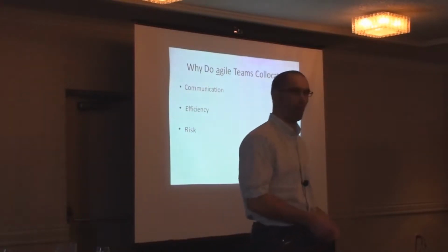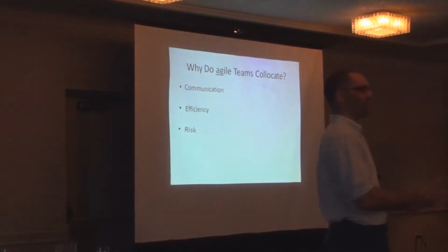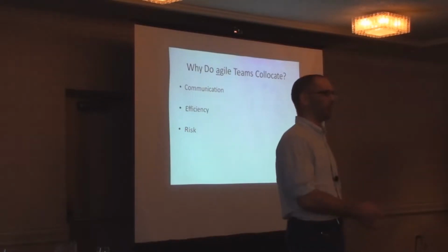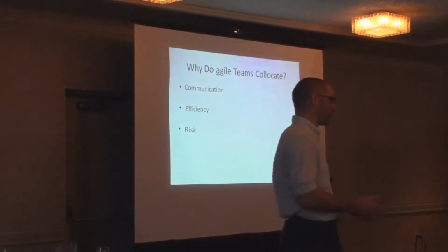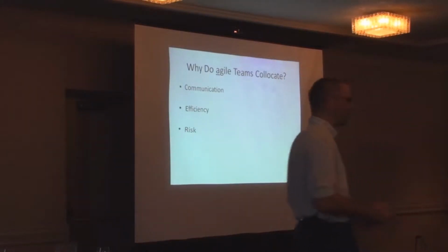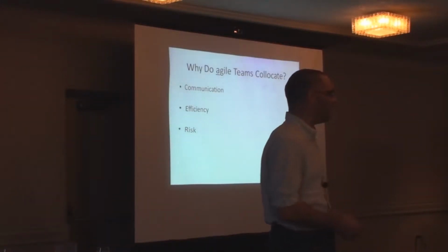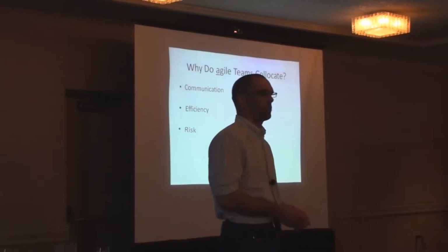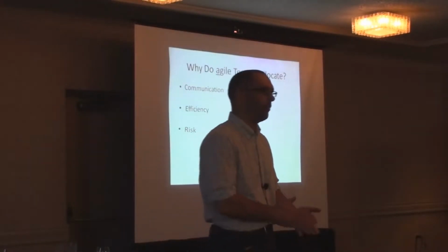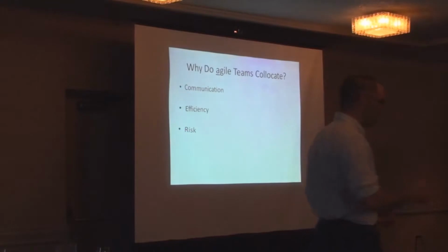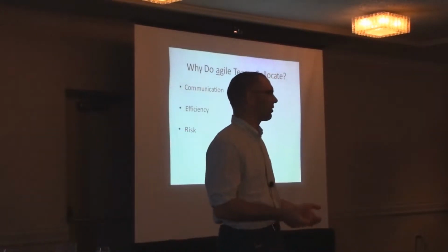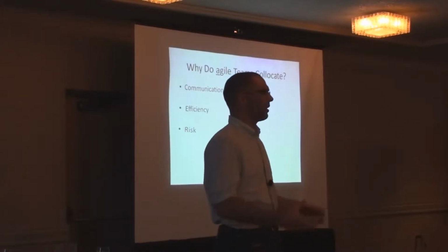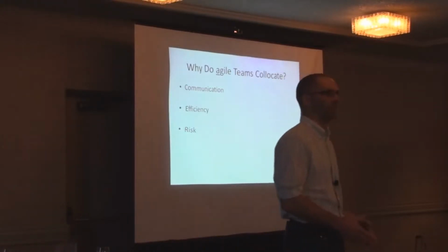So this friend of mine went round and he asked all the developers on the team to draw him a domain model, and they were all different, right? So a lot of it's about talking to each other. There have also been some studies done that say you can reduce failure rates by up to 20% by co-locating. I don't actually have the reference to that, but there have been a bunch of studies that talk about how putting everyone in the same room just lowers a lot of the taxes.